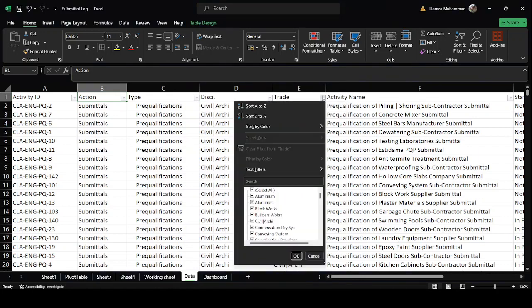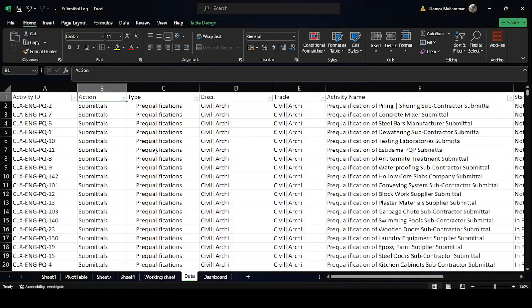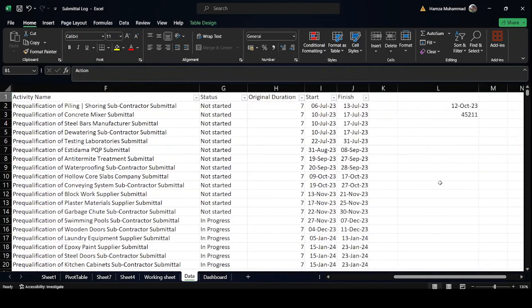In the Trade column, we divide the discipline into more detail. For example, civil is divided into substructure and superstructure; finishes into blockwork, tiling, false ceiling, and facade. Electrical is divided into lighting systems and power. Mechanical is divided into HVAC, chilled water piping, condensation piping, and equipment. So we have four main divisions: action, type, discipline, and trade.